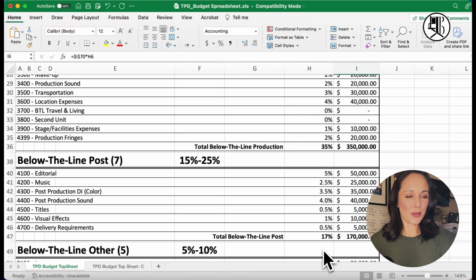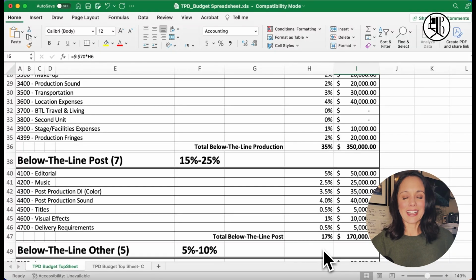And then on our post, what do we have for sound? We have $40,000. You go, I got 35. Always do that. Always just come in under, just so you can see what they're going to come in at, because their estimates will always be higher too. And then you meet in the middle. Little negotiating tip.